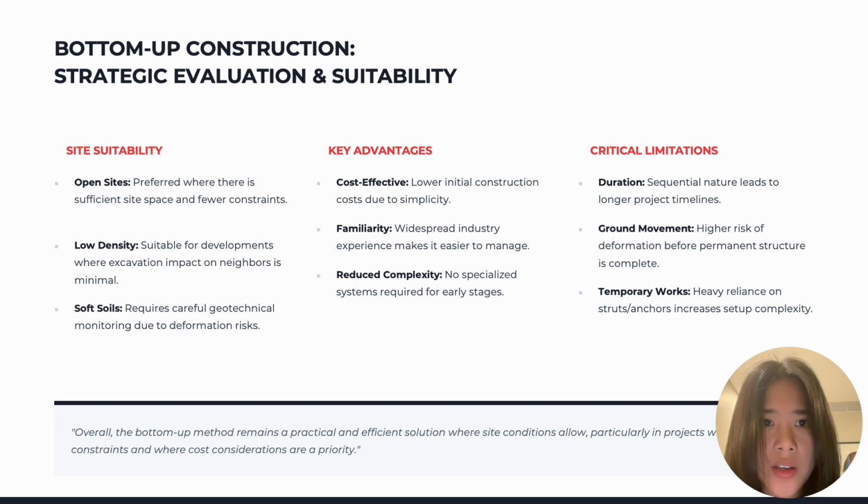However, there are some important limitations. First, the process is sequential, so it takes a longer time to complete. Second, there is a higher risk of ground movement. Finally, it relies heavily on temporary supports, which increases construction complexity.